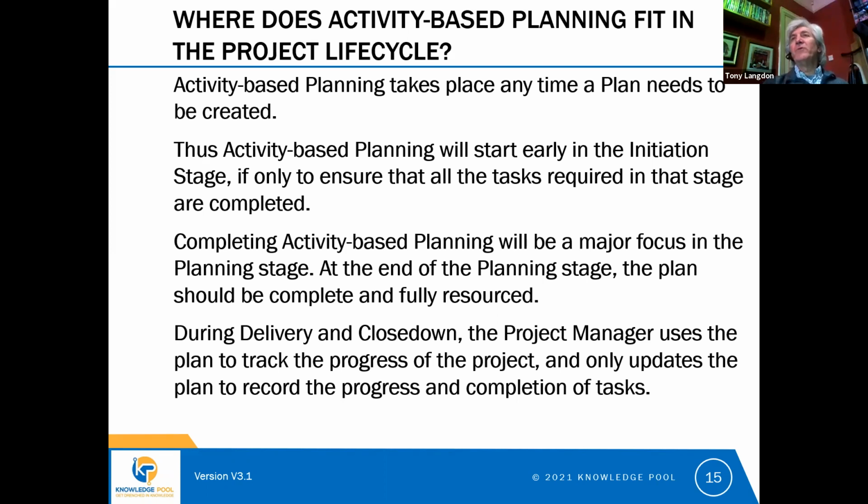But we'll also create a more detailed plan for the planning stage. And we do that during initiation so that we can see what resources we need for the planning stage. We can see what money we need, so we can see how long the planning stage is going to take. So we create a detailed plan for the planning stage during initiation. And then during the planning stage, we follow that plan.